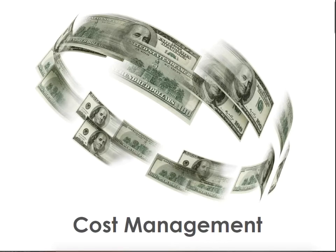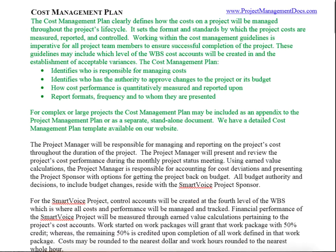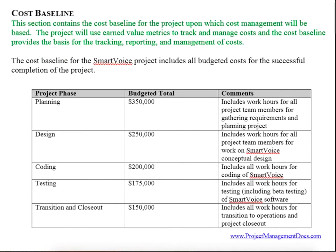Cost management is just understanding exactly what it's going to cost to get your project completed. Typically this does not include people's salaries, but it would include things like catering for an event when you meet with stakeholders to identify scope — and that gets added to your project cost. Here's an example of the cost management plan component of the project management plan. Here's a cost baseline template, which basically says: during these phases of my project, I'm going to have to spend this much money. Here are the comments, including the assumptions that went into the budgeted total.